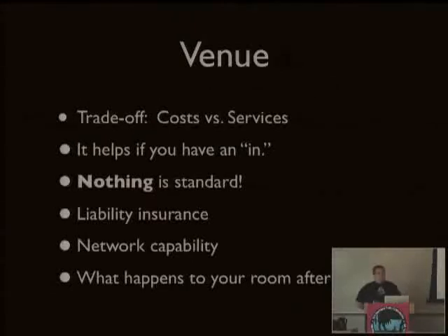If you want to use TPF's insurance, you need to get me the contract with the exact requirements as soon as possible, so that I can go back to our insurance company, review it with them, and make sure that they add that venue to our policy in adequate time for your event.